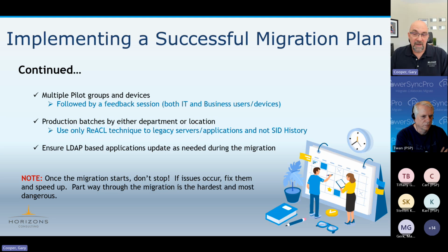I've had organizations argue the pros and cons of both. I tend to do it by location more, because I have to think about how I support those users after the migration of that workstation. Do I have people on the ground? Do I have enough support staff available, or service desk, help desk, phone call capacity? Do I need to augment that with outside contractors for this migration? So how do I do all that? And doing it by department that might be spread across multiple locations may prove to be very difficult.